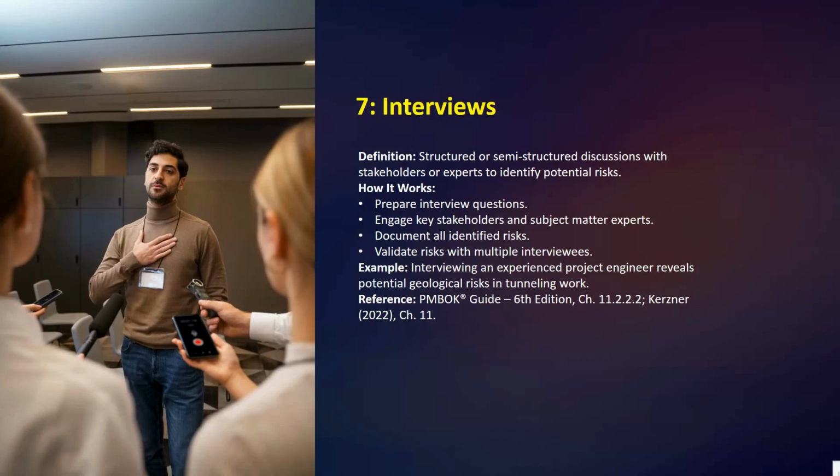So this technique provides a personal and in-depth way to gather information and uncover risks that might not surface in a group setting. Okay, so here we have the definition: structured or semi-structured discussion with the stakeholders or experts to identify potential risks. So how it works: prepare interview questions, then engage key stakeholders and subject matter experts, then document all identified risks, then validate risk with multiple interviews.